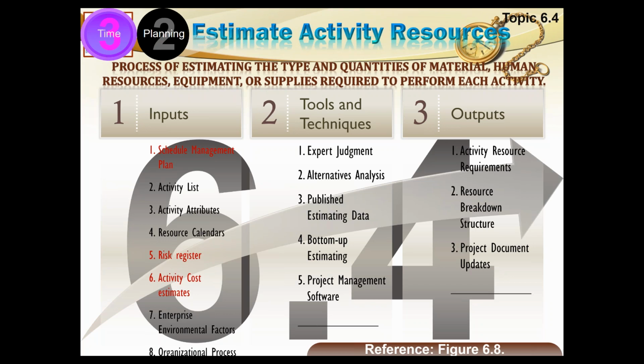Next process is estimate activity durations. Here we assign the work periods or time durations to each activity, how much time each activity will take. And naturally, we do have an estimate of the resources already. We have asked for an expert mason to be placed on this job. So if an expert mason comes in for this job, how much time will this job take? So we can easily calculate the work periods based on the assumption of the resources. But if the resource we asked for, we don't get that, we get a novice mason, then probably the work period is going to change accordingly.